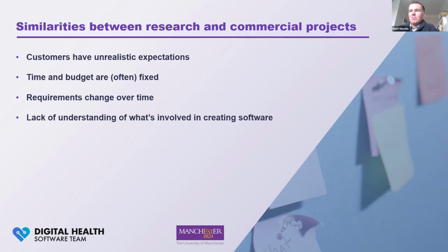Requirements change over time. I can't recall working on any project, either in industry or in academia, where the requirements that were set out at the start of the project remained constant to the very end. Inevitably things change because people's views of what they want change as they start to see things being built. And the lack of understanding of what's involved in creating the software is common. Unless you are working with a customer who's got previous experience in software engineering, they might understand some of what's needed, but they probably don't understand quite a lot.